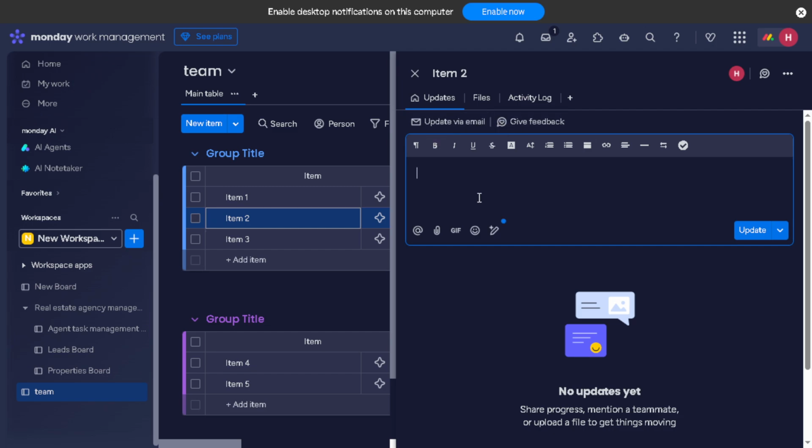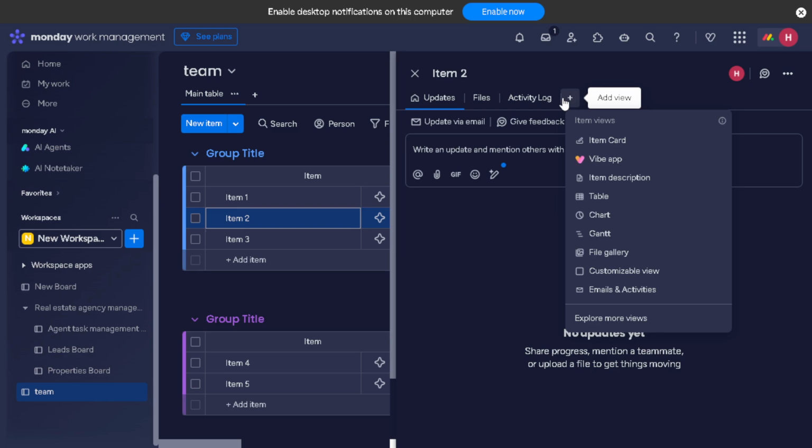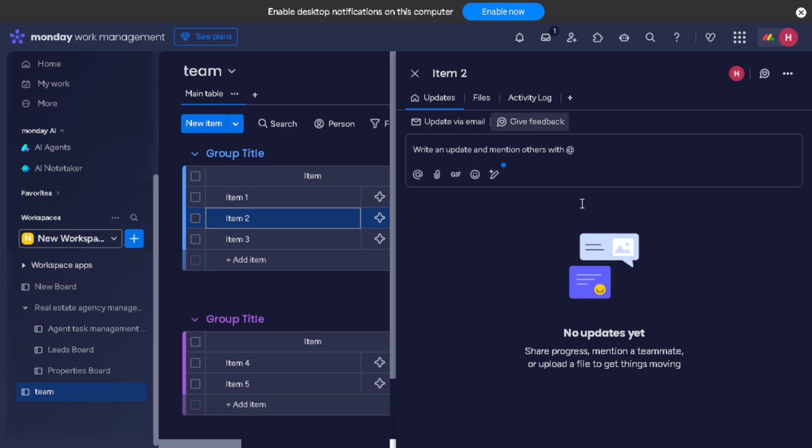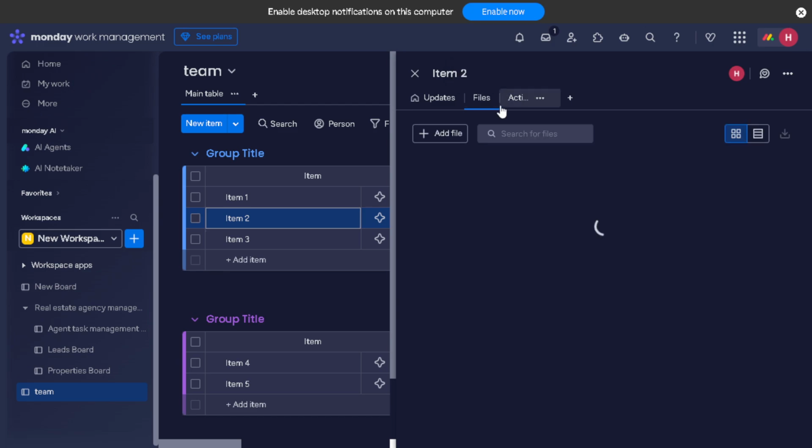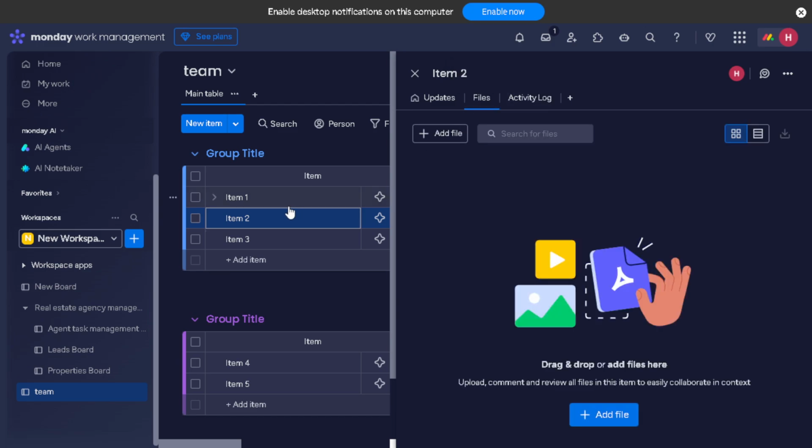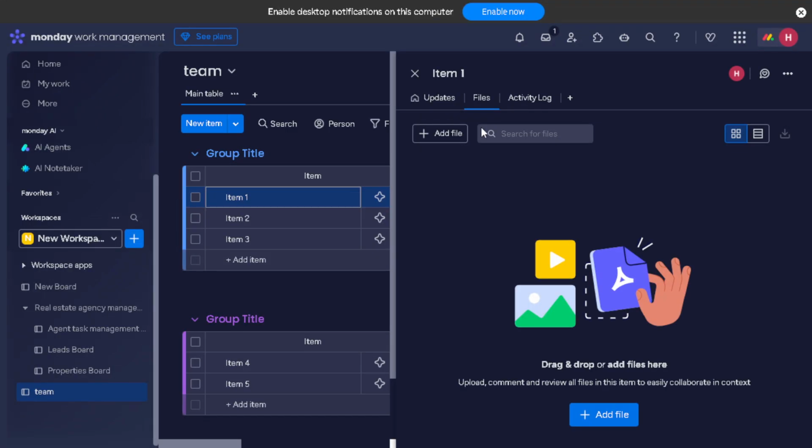Once you have everything set up, you can finally start tracking your time. Simply select the task you are working on. The 7pace Timetracker interface is user-friendly. Here, you will find options to start, stop, or even manually log time directly within your task. This flexibility allows you to easily manage how you're logging your time, whether you prefer to start and stop as you work or enter the time afterwards.